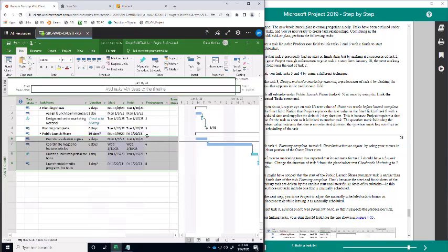Okay, so did you see that the sequence was established automatically? Okay, and on the left side as well, that sequence is being respected based on the start and finish dates. Really and truly that happened based on the duration, but as you can see, for instance, this task will take 2 days, and once that finishes, you can start task 7 and so on, right? 2 changes. One, it adds the predecessors automatically, and 2, the Gantt chart changes.